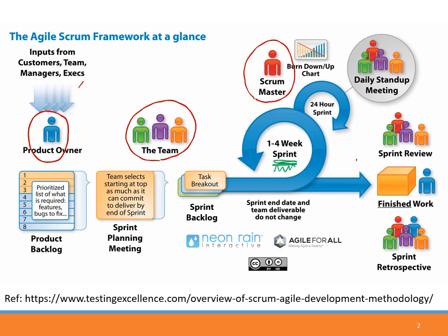And usually, each sprint could be from 1 to 4 weeks. You decide. I mean, within the team, it can vary. But in our ISDM project, maybe we can agree that we will have a 2-week sprint. So that means we can approximately have 3 sprints until the end of the semester, something like that. So a sprint is a time-boxed iteration in which we run the Scrum. Okay, what is the next thing that I need to let you understand?